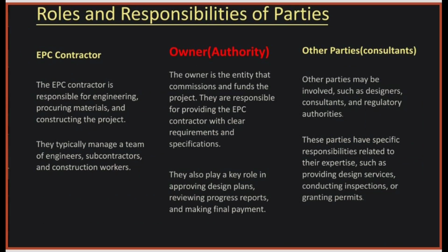Let us know the three parties of the EPC mode of contract: the EPC contractor, the owner or authority, and the other party, the consultant. Whether a consultant will be recruited or not depends upon the cost of the project. The EPC contractor is responsible for engineering, procurement of material and constructing the project. They typically manage the team of engineers and subcontractors.